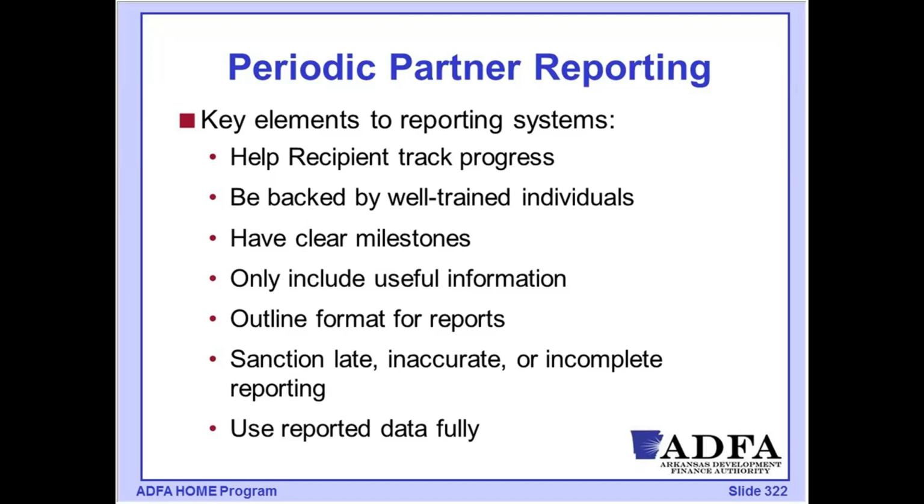If the expectation was that foundation would be completed by July, if it's August and it's not in, they want to know that because that project is now behind schedule. We want to make sure that actions can be taken to make sure that that project will move forward in a timely fashion, get back on schedule.